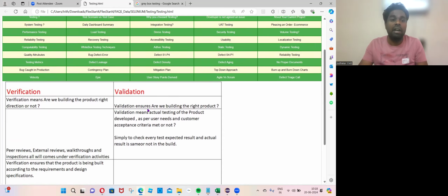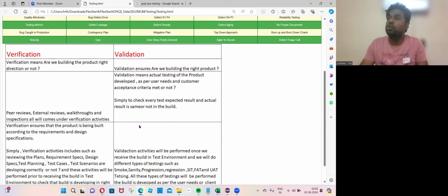In the V model, the project duration could be 3 to 4 months. In Agile Scrum, there are monthly releases. In the V model the requirements are frozen, whereas in Agile Scrum the requirements might change, and design and requirement changes will be there. Whatever was agreed initially will be delivered accurately over the next 3 months.